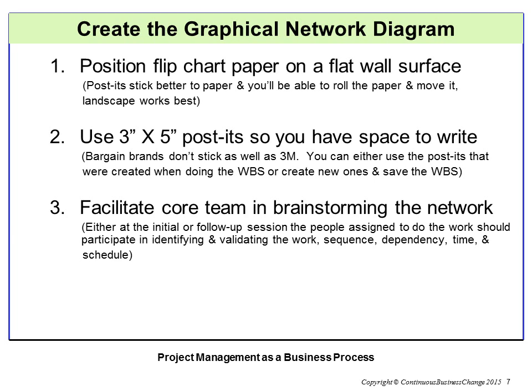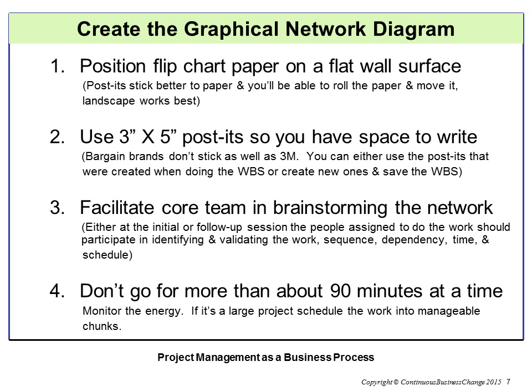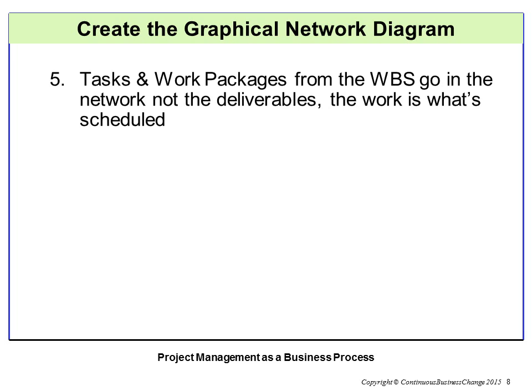Facilitate the core team in brainstorming the network diagram. The people assigned to do the work should participate in identifying and validating the work, the sequence, the dependency, time, and schedule. Monitor the energy. If it's a large project, schedule the work into manageable chunks. Tasks and work packages from the WBS go in the network, not the deliverables. The work is what's scheduled.